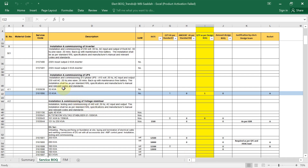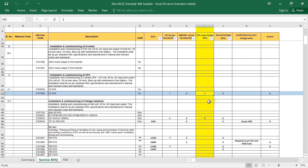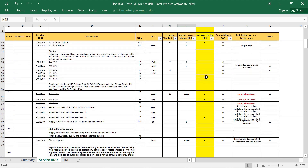In the description you write down the detail description of the UPS. Different capacities are listed, and in our project we have a 15 kilovolt ampere UPS. The unit is 'number', so write down the quantity: only one UPS of 15 kVA. Write down quantity one and scroll down for the next item.